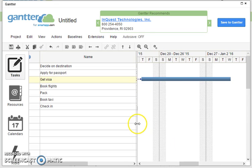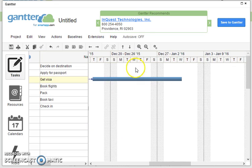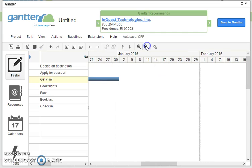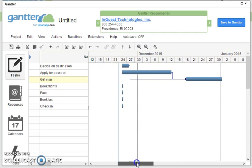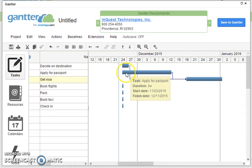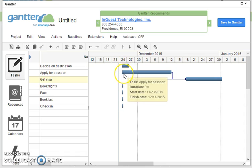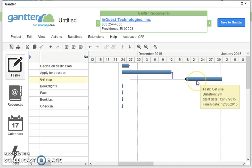If I close this up a bit so we can see it better and zoom out, what we can see is that we've got this task here deciding on destination, we can apply for a passport at the same time, but both of them are needed in order to get a visa.